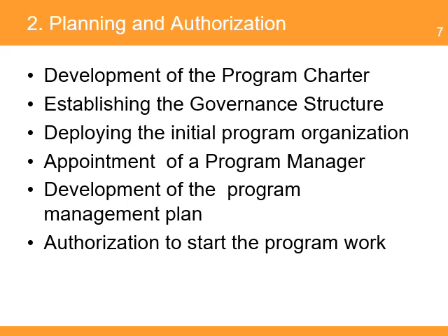During this sub-phase, the program organization is defined, and an initial team is deployed to develop the program management plan. Key activities in this sub-phase include the development of the program charter and its governance structure, the deployment of the initial program organization, including the appointment of a program manager, and the development of the program management plan. Once the plans have been approved, the program manager will authorize the initiation of program activities and communicate with stakeholders.